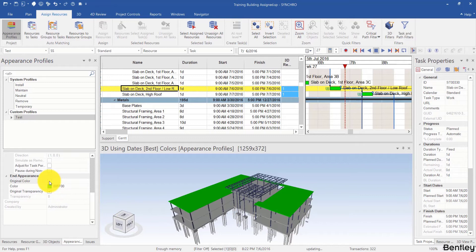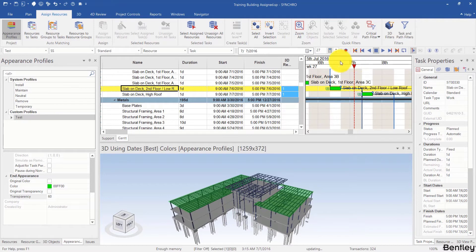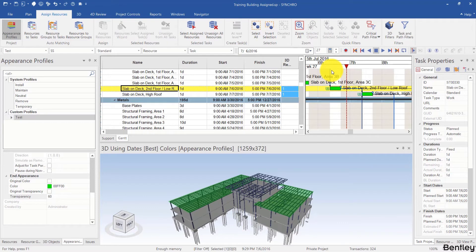I can also add an end appearance — for example, give it a color and a transparency. We typically use this when we have another task with this resource assigned to it with a different profile, and we don't want it to temporarily revert to its original color, which is confusing visually. For example, people might think the object is done when it is actually not. So we give it an end appearance and make it identical to the start appearance of the next task.